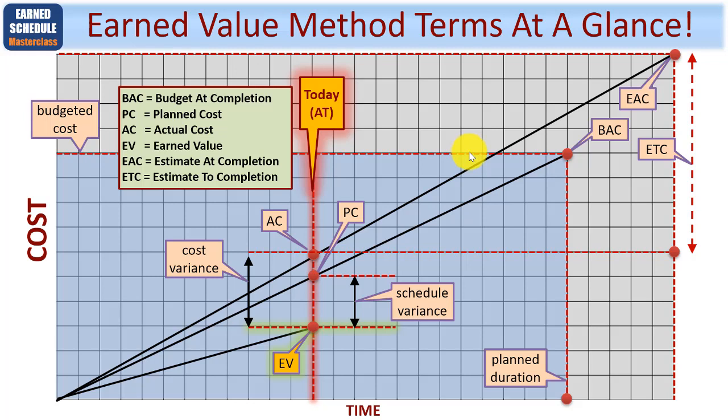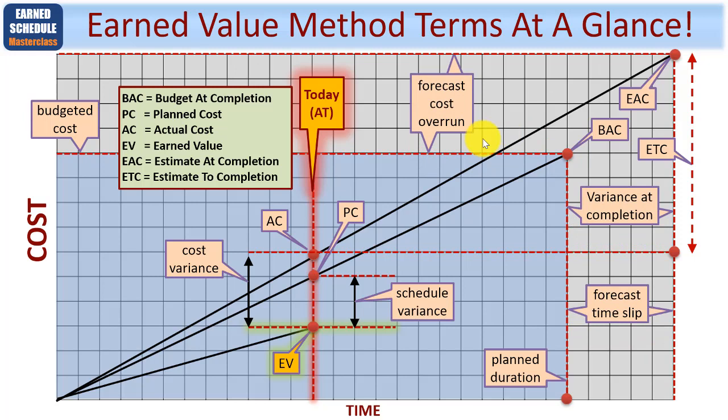And therefore, continuing the line here, this is your estimate at completion and your estimate to completion. I've merely shown it as this amount here in terms of cost. So you can see quite clearly the way I've drawn this, because of the metrics you can see here at this midpoint, you're forecasting to overspend, and this amount would be your cost overrun, whatever this amount is here.